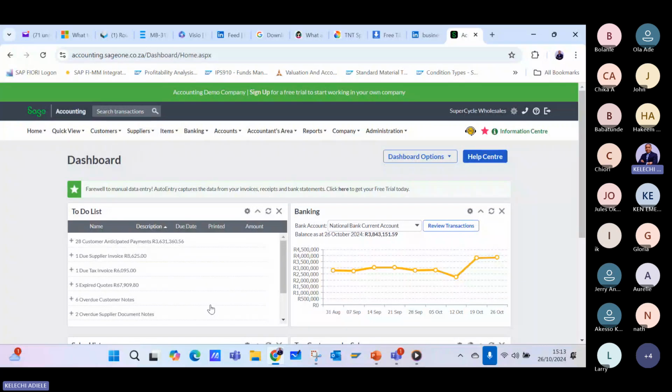They behave in a way that they can't get the information they need, because either they're always complaining, or they're fighting with one of the stakeholders, or they have not done a stakeholder assessment or a communication plan to even know how to get the information they need by stakeholder. Because all stakeholders, you can't approach them the same way. You have to come up with a communication strategy for every stakeholder. Some stakeholders might need a call, some might need a text message, some might need an email.